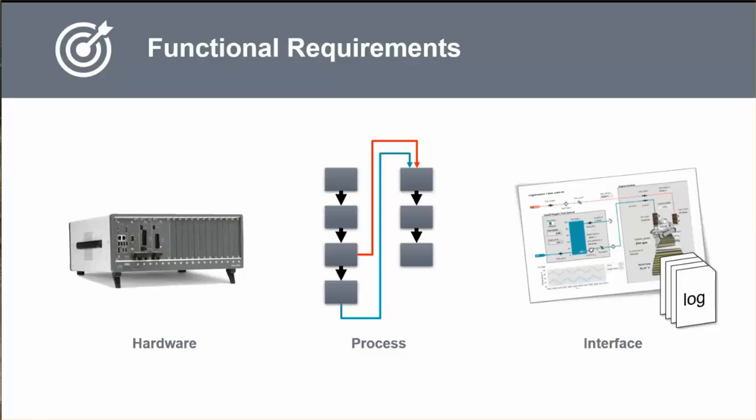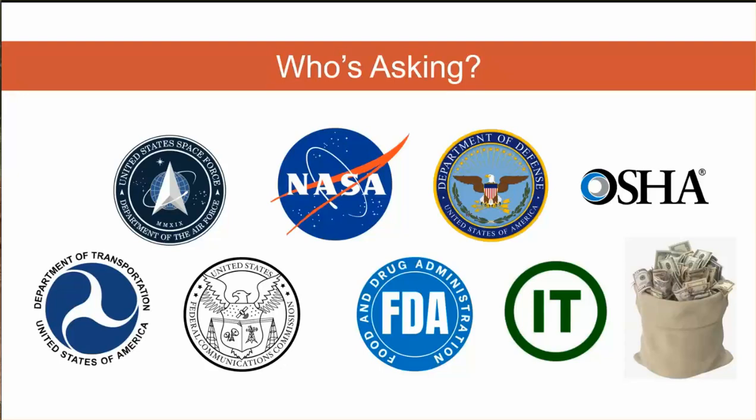A lot of times we can have a 1-hour meeting with a customer, write a 1-page statement of work that outlines this, and then work with them iteratively until it's done. That low overhead method works really well for certain projects. That, as many of you know, does not work well if you're writing code for some of the 3-letter agencies.